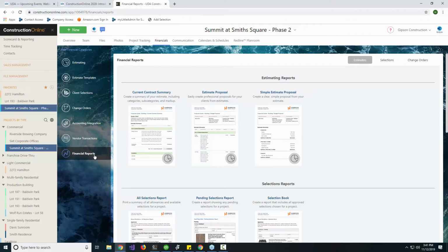Often what's best for job costing is to pull it up by maybe one level. You might not always need to job cost at the individual piece of lumber level, but you do want to do that on more of those subcategories to make sure the budget is staying healthy. And then in many cases with the client, the end goal is to provide them with a comprehensive list of what's included without giving them a price breakdown for each little thing. So we give you those options and more.